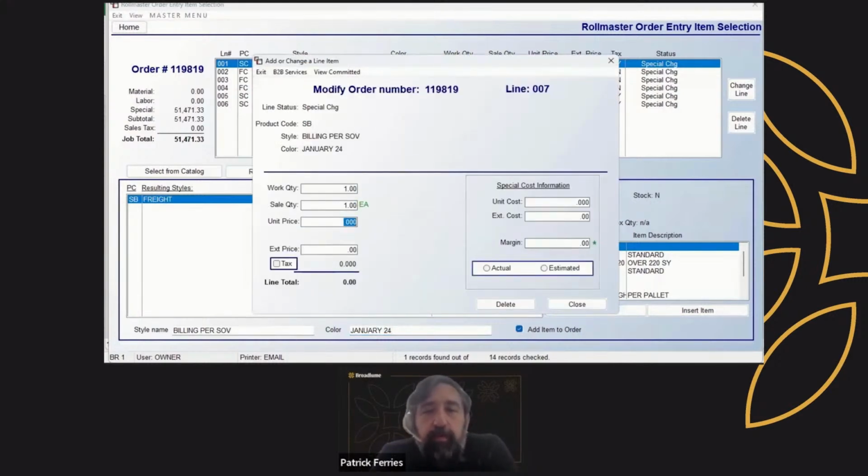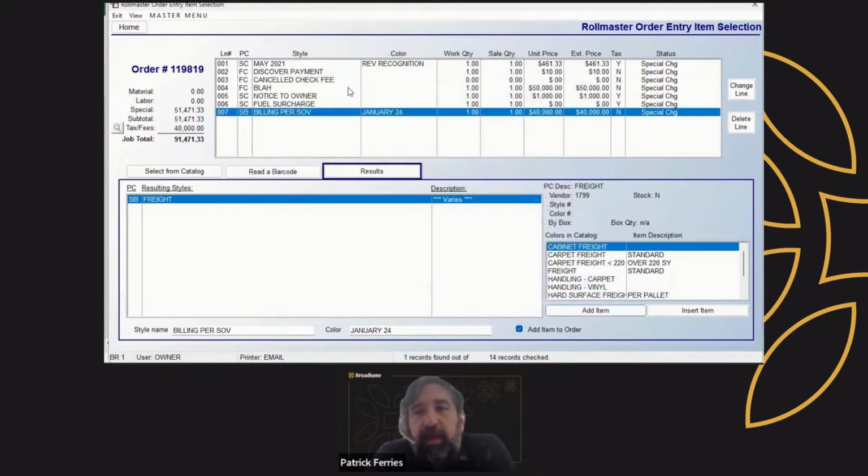And I'm going to do one billing for 40,000. And then I would invoice this single line off. And I'm not typically going to send that to the GC because they're looking at the AIA documents. But that's going to recognize the revenue. And then it's going to also hit receivables so that the receivable starts aging and I have a good AR in my system.